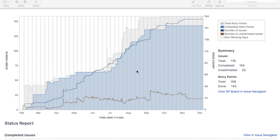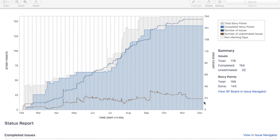If you see the progress of the story point completion or the issue count completion, you can see very clearly the unestimated issues are coming down further. If there is any scope change or new additions in the issues, then the graph goes up for some time and then again comes down further.